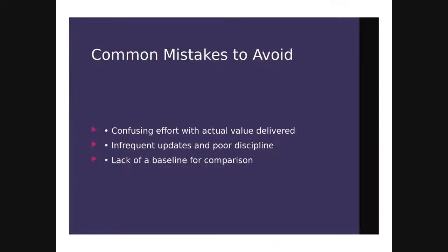Some of the mistakes that you need to avoid as you use earned value, it's confusing effort with actual value delivered. So you could put in 10 hours, doesn't mean that you actually delivered the equivalent of 10 hours of value when you boil it down. So you put in 10 hours to complete 10 things, right? You told management, I'm going to get 10 things done in 10 hours, but you're done with the 10 hours and you only got 4 things done. Now you can see how effort is not the same as value.